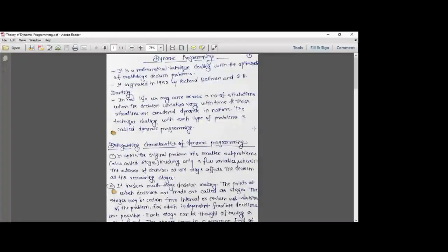Let's say I have a building to be constructed, and it has 15 floors, and each floor I am considering as a milestone. So I am checking the progress of my project after every milestone. After finishing every floor, each milestone is completed, and I'm checking the progress against that milestone.